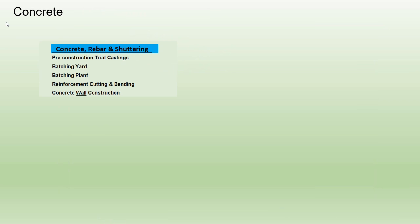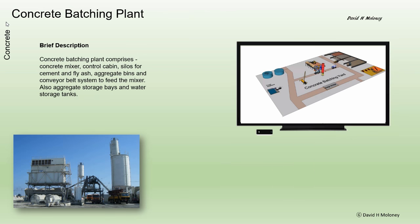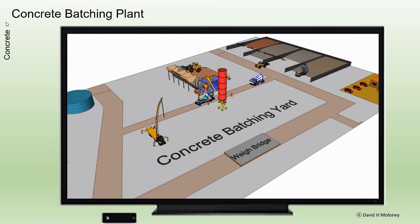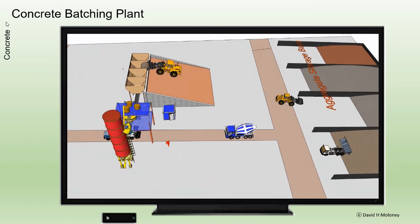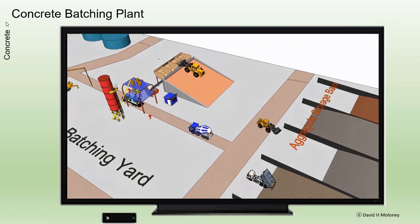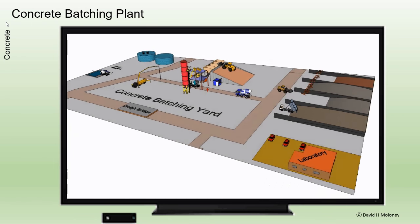Concrete, Reinforcement and Shuttering — Pre-Construction. Full-scale trial concrete castings shall demonstrate and document that all requirements for the concrete and the execution of the work are fulfilled simultaneously, using the actual methods and performed by personnel as for the future production.